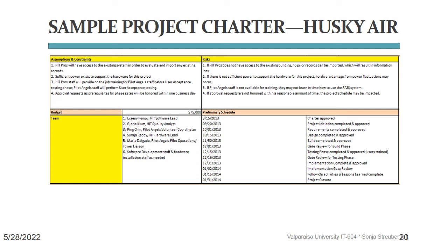Risks, of course, are the things that could potentially go wrong in the project. As we identify initially the risks at the outset of the project, we want to make sure to keep a good eye on these risks and constantly ask ourselves what else could potentially happen and perform what is called continuous risk identification throughout the project. Continuous risk identification occurs throughout the entire project cycle. It starts even before the project charter in the business case formation. And so the risks that you will be seeing in the project charter partially come from the business case even.